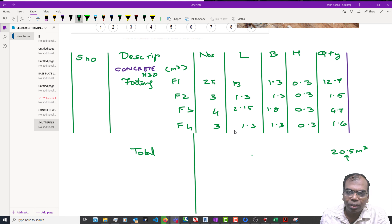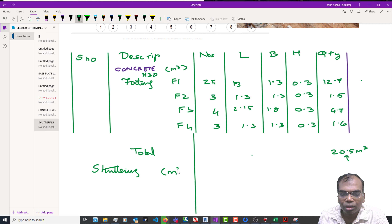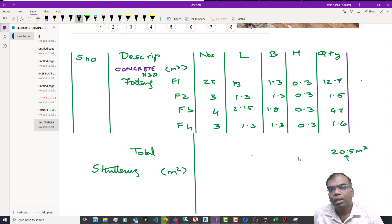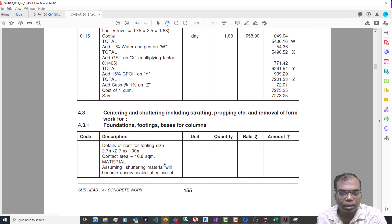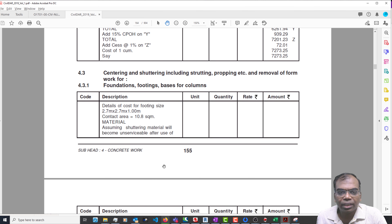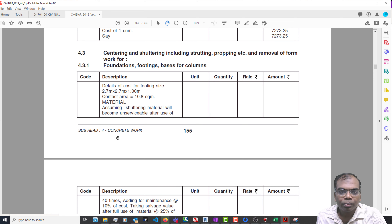Moving on, when I go for shuttering, I am going to have something slightly different. For concrete it was a cubic content, but for shuttering you will have something based on square meters. Let me open the Delhi Schedule of Rates and look at the centering they have done. This is the centering for a footing done for 2.7 by 2.7 meters. They are also saying the contact area is 10.8 square meters.